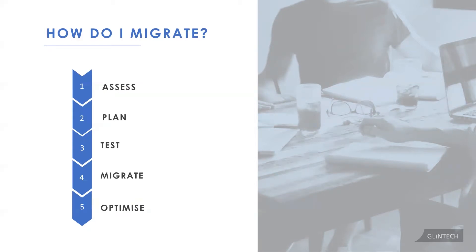These five steps are not just for migrating from on-prem to cloud. They apply if you're starting fresh in cloud, or if you're merging existing instances — many organizations have multiple Jira or Confluence instances that need to be consolidated. The steps are: assess, plan, test, migrate, and finally optimize.